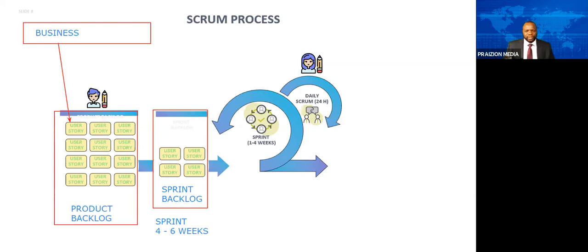The chickens are those outside, like in the business. The customer, those are the chickens. And in the daily Scrum, we do not let the chickens talk. They listen. After the meeting, they can speak. We also try to shield the team from those chickens that drag them out and waste their time. So the Scrum Master puts a barricade, if you will, around the team to prevent the team from being pulled out into unnecessary things.